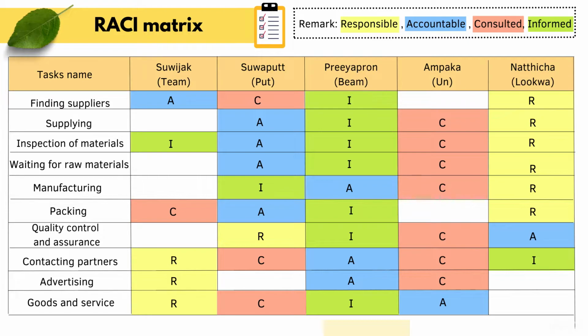In the position description, responsible means this person is responsible for completing the work required for the task. Accountable means this person is ultimately accountable for coordinating the effort to complete this task. There is only one person accountable for each task, who delegates to others who are responsible.